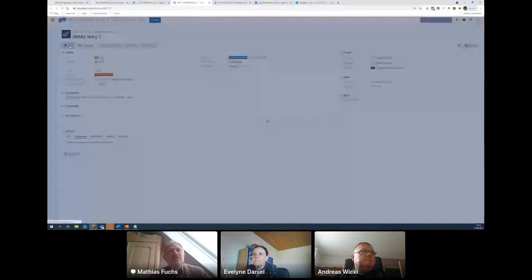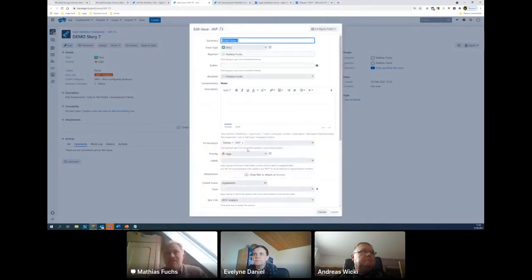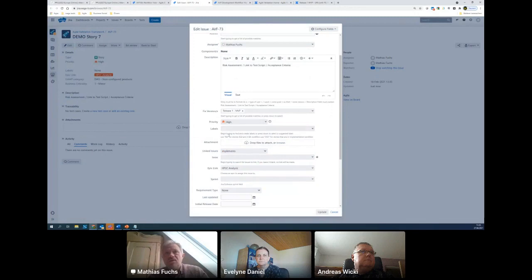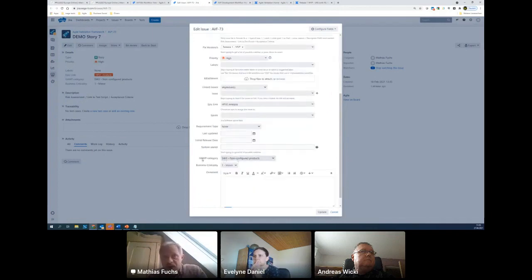So I would edit this story and fill in all the information according to our predefined definition of ready. Acceptance criteria added, the test cases linked, the summary of the story written in a proper format, and so on. Priorities set correctly. If there are linked issues, so requirements linked to that story, I could edit them here. I would provide or check the risk category. In our system, we have the GAMP category and the business criticality. You could, of course, add many more properties here; that's completely free to be configured.